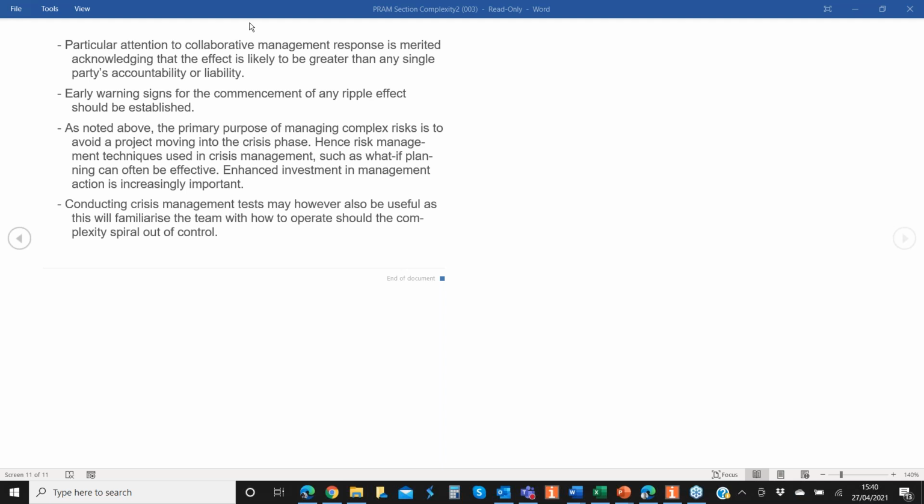Can I ask, especially for multi-year projects, should there be some kind of assessment of whether it's still the right thing to be doing? I can see how you could get onto a track that says we've started so we'll finish, but if it goes over a number of years and the external world changes, the internal world changes, how are we making sure this is getting reassessed? That's a good point. That whole management of change takes on a whole new dimension. It's not about managing the next deliverable or the next 6 months. It's about whether or not we really should be doing this at all now.